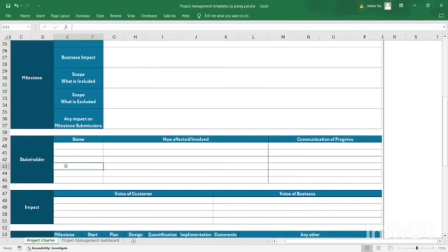The sub-consultant is also a major stakeholder. So in that time period, the project manager should understand his concern and bring him down to a particular cost. Discuss the financial impact with him and agree on that point. That is so that our project does not get impacted. That's why we should always consider the escalation percentage in our projects.